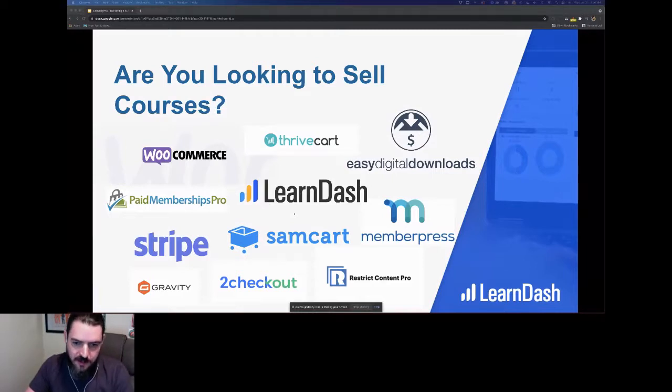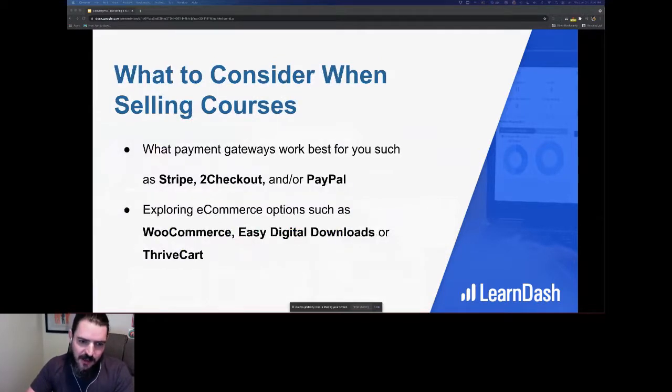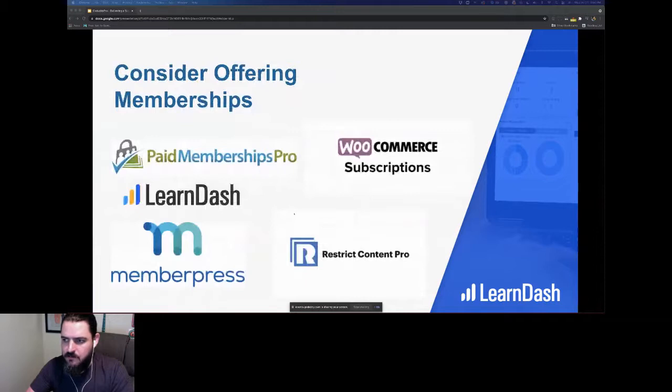You can sell your courses. These are just a couple of the ways you can sell your courses. Find one that you like, one that makes the most sense to you, learn it, and make sure you accommodate for the time and the budget. You can sell directly, through your LMS or with an add-on. Here's a couple of membership options. I personally just go with the subscriber level and use software licensing to manage my subscribers. But membership also works well if that's something you want to do. It takes a lot more work. So if you were going to sell a membership site, I would recommend adding probably about a week's worth of time to setting all that up, making sure the communications are there, the back and forth, all that stuff.